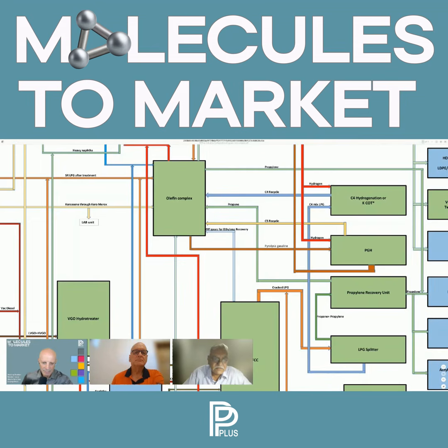Is it possible to bring ODCs, over-dimensional cargoes, into the plant to minimize site work? Is it sitting near the sea and the shore where we can go for higher levels of modularization so that you can minimize the construction sequences? Where exactly is the plot?